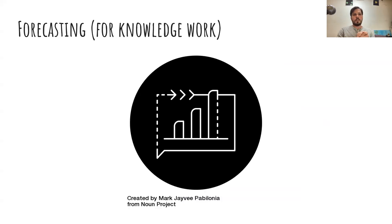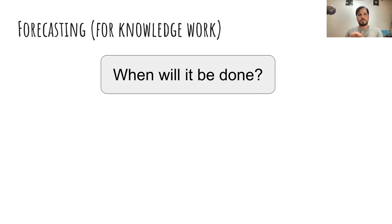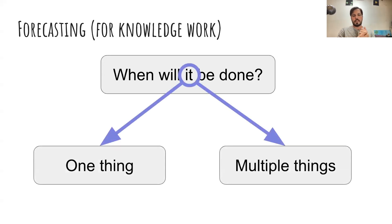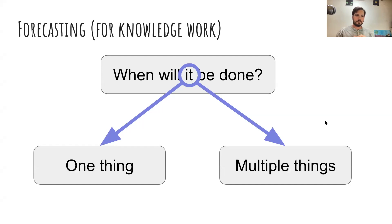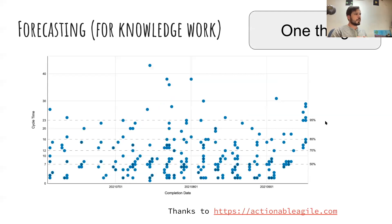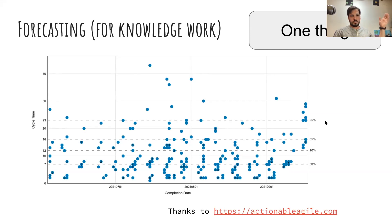So how can we take those practices and apply them to knowledge work? The original question — when will it be done — can mean two different things. There's either one thing: when is this one card, this one epic, this one thing going to be done? Or multiple things: when are we going to have this bucket of stories or features done? Each requires a different kind of forecast. To forecast a single thing, we can use a cycle time scatter plot, tracking cycle time on the vertical axis and the date something finished on the horizontal axis.